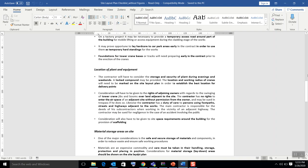For other plant and equipment, since the project includes piling, the piling machine needs to be brought into the premises carefully. You need to build access to the main project and to the accommodation. Accommodation should be placed at a corner of the site premises, far away from the main entrance, as it should not be at the main entrance. A pathway to accommodation must be provided so people can reach it.